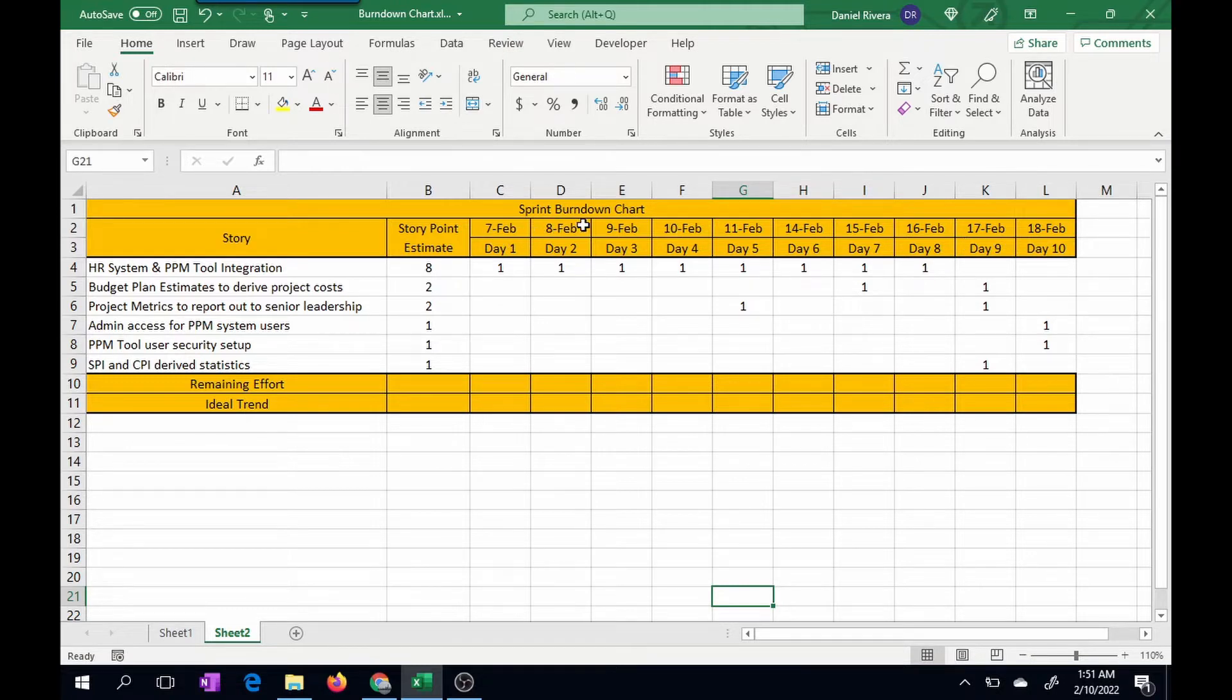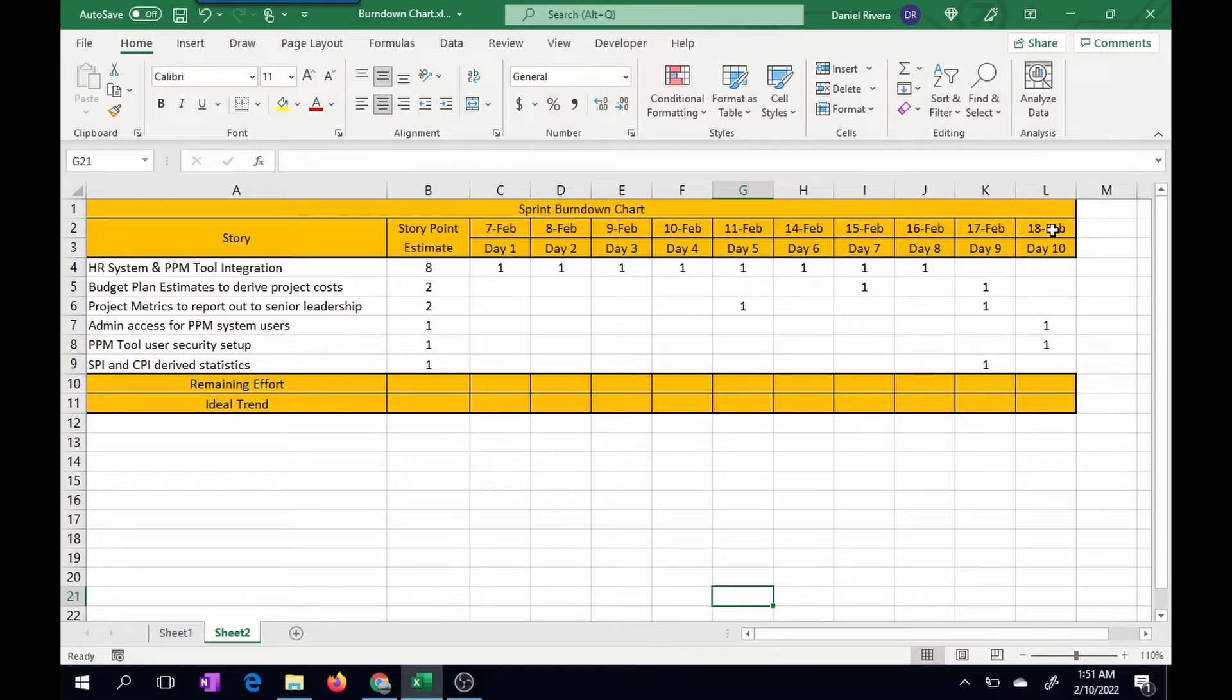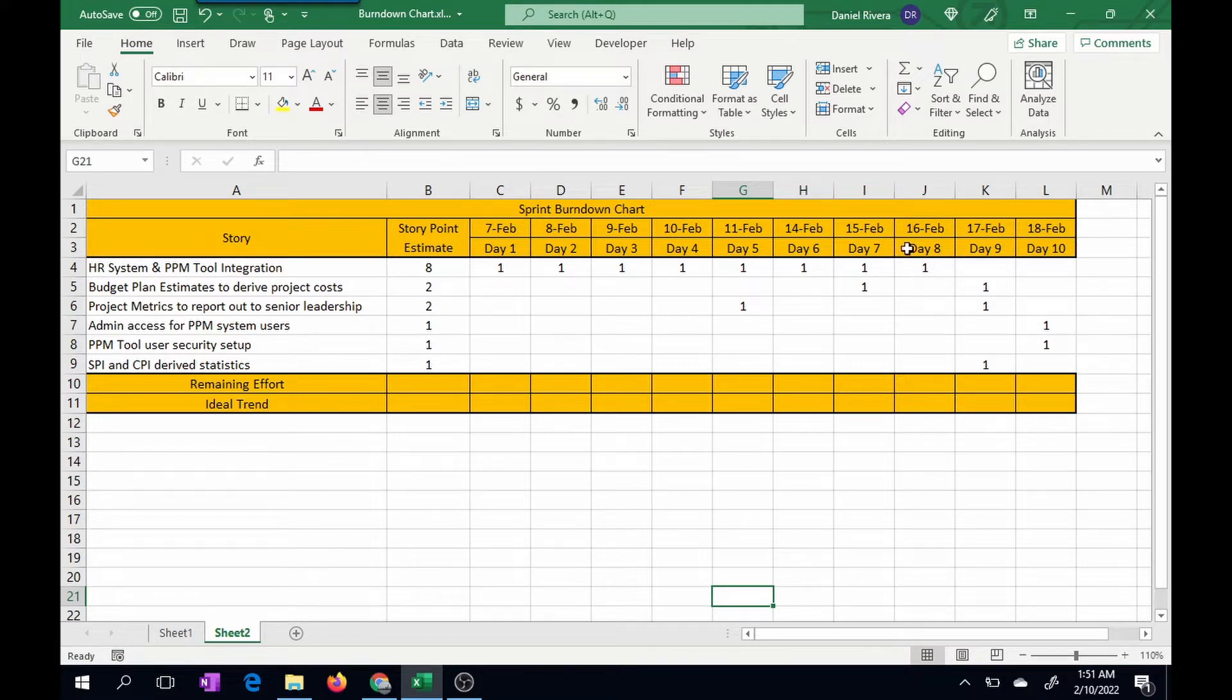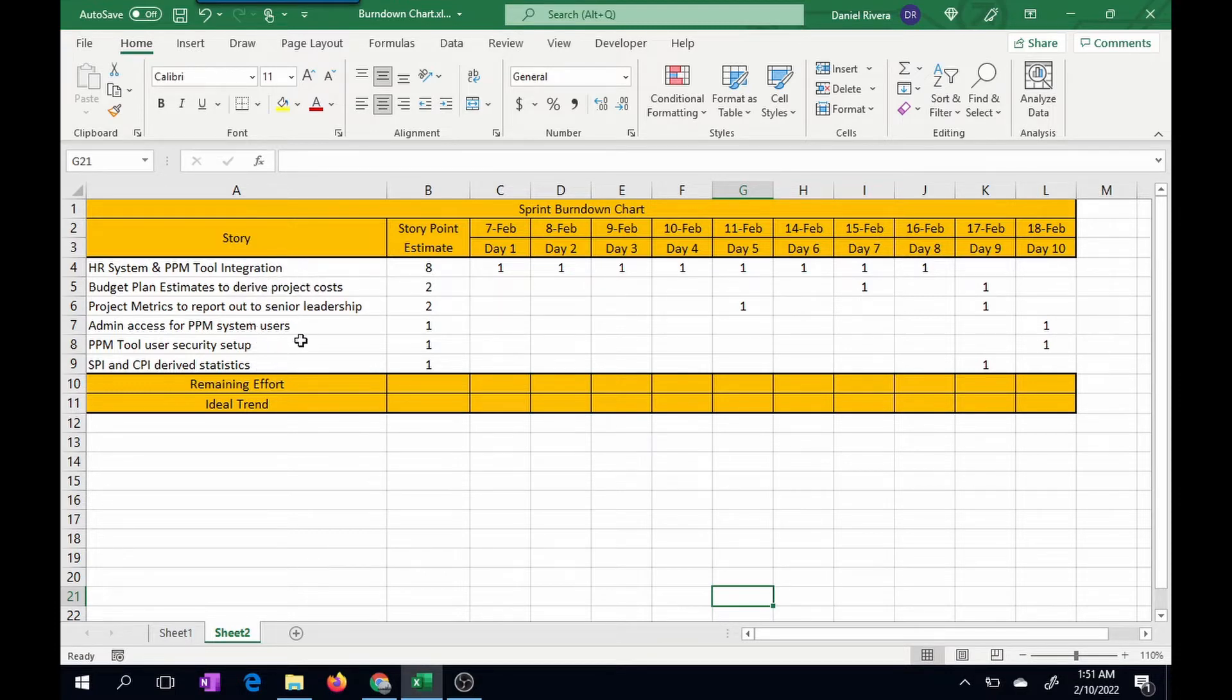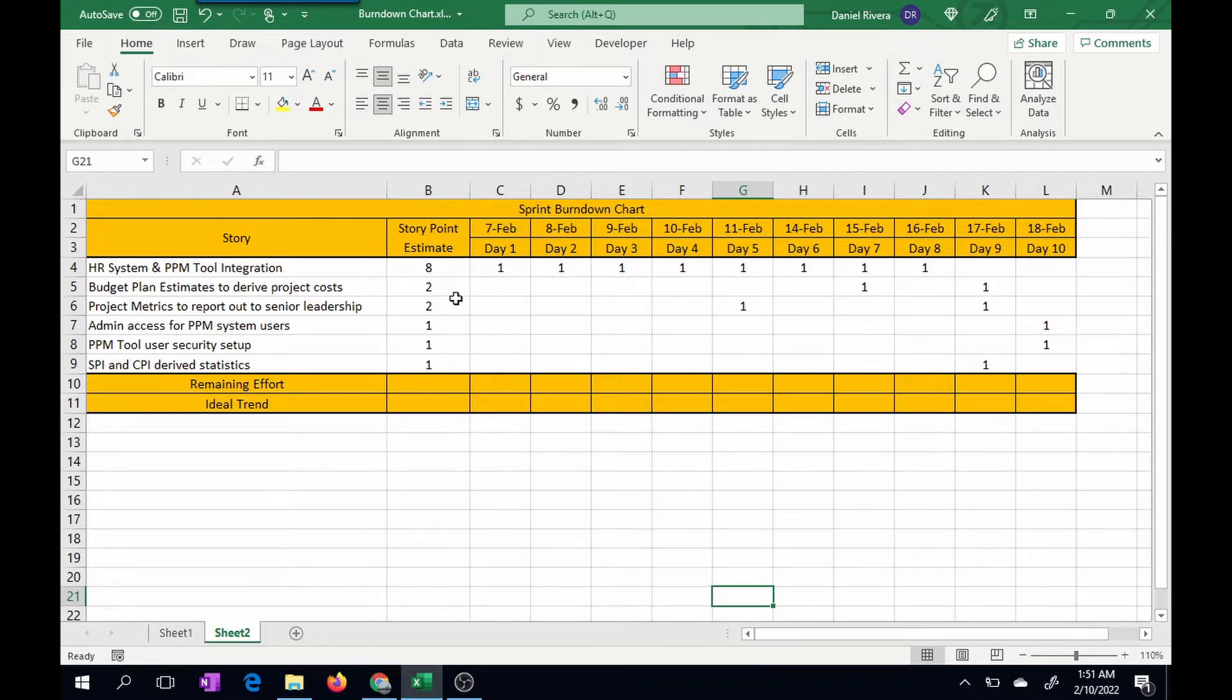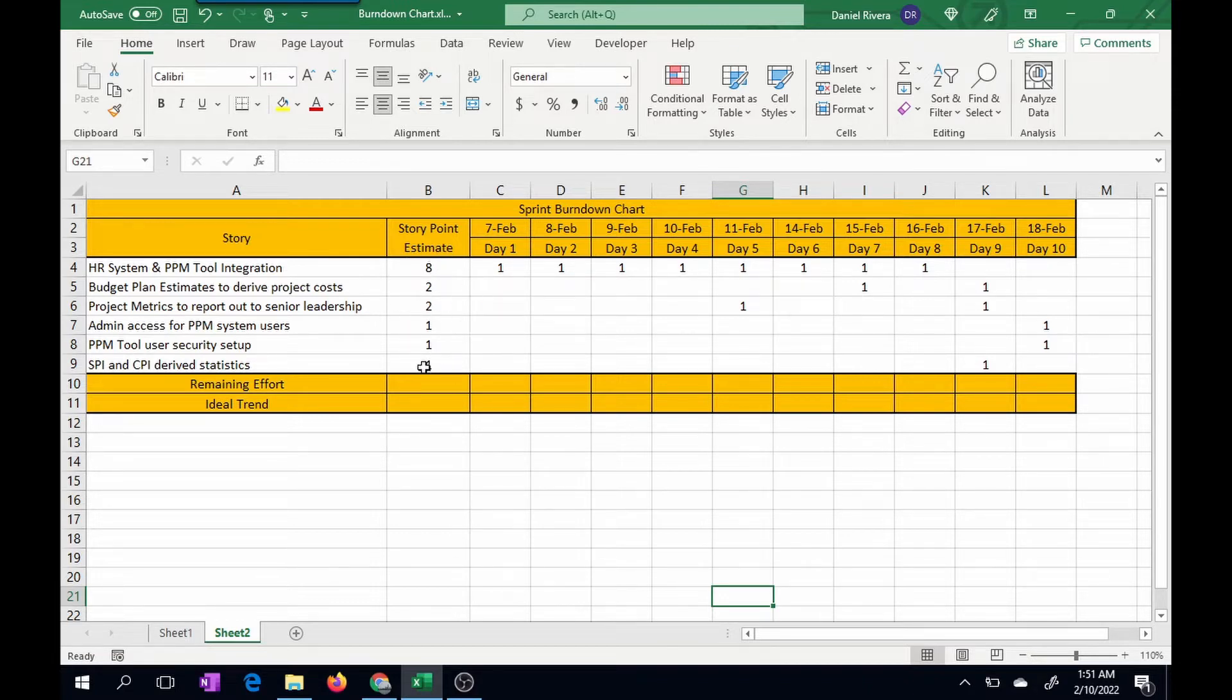If you have, for example, a three week sprint or four week sprint, you just have to make sure that you adjust the days as well as the dates here. And then here running along the left are the actual stories that we're going to be implementing during this particular sprint. We made the assumption that the size of the sprint would be 15 story points. I have that listed out on this column here with the story point estimate.